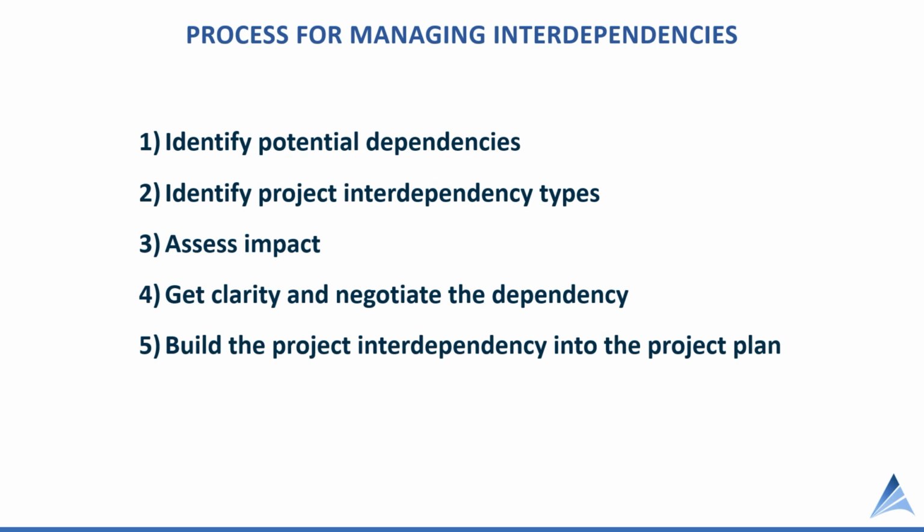So that's step 1. Then we want to identify the interdependency types. Is it a technical dependency? Is it a schedule dependency? Is it a resource dependency? Or is it an information dependency? That's step 2. Third step is we need to assess the impact.